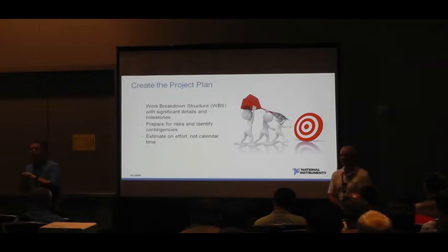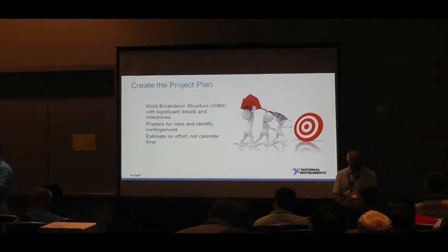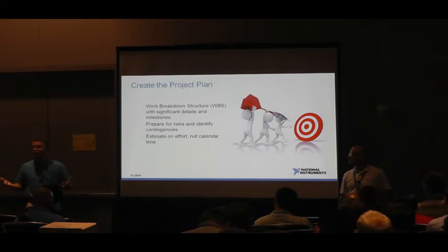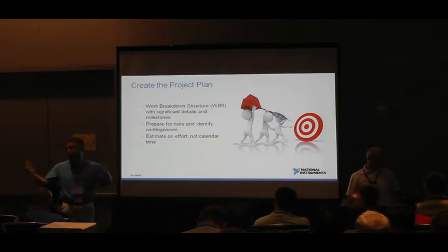Right. So his point was, oftentimes if the requirements are not well defined, you might say, I tell you what, we will engage you on a discovery phase where we determine what the requirements are. And a lot of times that is a paid discovery, and that's a negotiated thing that you go through with the customer. And that's a great point.